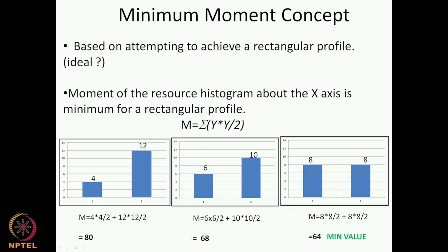What is the profile? What profile is the best for me? So this is where the concept of minimum moment comes in. Remember, what we are trying to do is get as flat a profile as possible of the resource, and this is ideal, but we want to get it as close to this as possible.